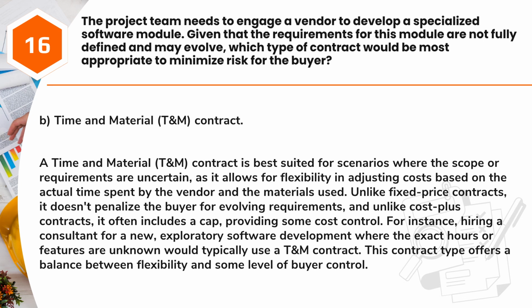providing some cost control. For instance, hiring a consultant for a new, exploratory software development where the exact hours or features are unknown would typically use a T&M contract. This contract type offers a balance between flexibility and some level of buyer control.